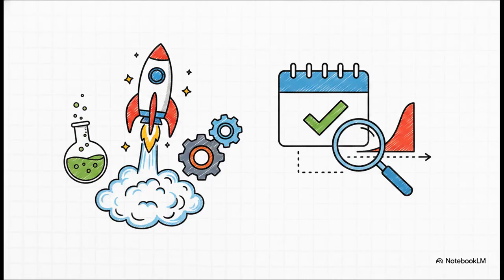So when do we actually use this in the real world? Well, you deploy PERT when you're building something completely new. Think research and development or software development, areas where these specific tasks have literally never been done before. As humans, we suffer from the planning fallacy, right? We are notoriously terrible at estimating how long new tasks will take, so past data just isn't perfectly reliable. PERT is also incredibly useful when you absolutely need to quantify schedule risk, like figuring out the exact probability of finishing a project before a very strict client deadline.